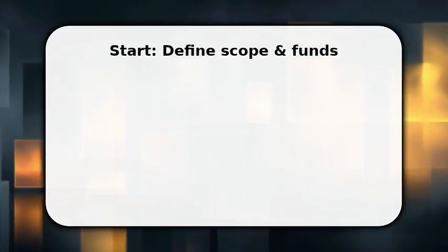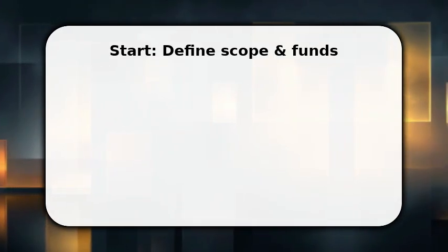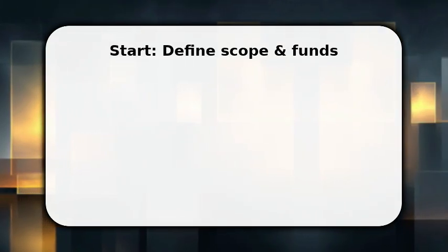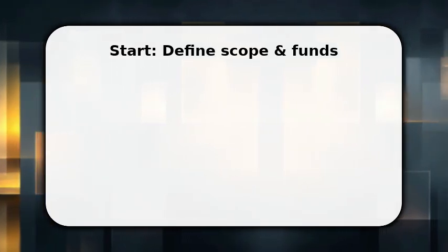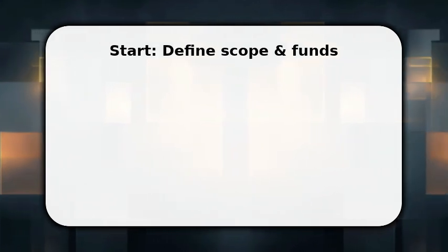Make sure to assign cost owners for each line item and configure your tracking tool now. This prevents guesswork later. You'll also set approval thresholds for purchases, so small buys flow fast while larger ones require sign-off. This first step creates accountability and a clear financial starting point.